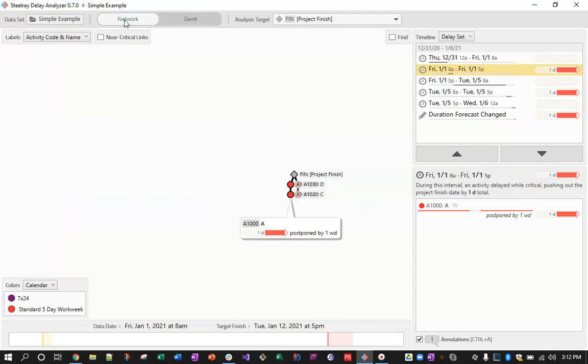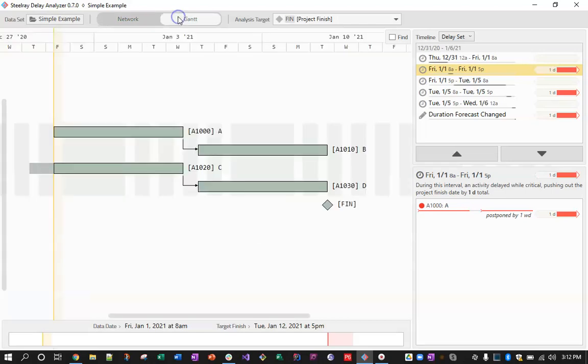So the network diagram view, first of all, is not on a timeline. So this level right here is not designating a certain point in time. We do that in the Gantt. And the Gantt chart traditionally moves left to right, and we do as well. You see this yellow bar here. That is really representing the status date or data date in Primavera. And as you can see, when I hover over it, the cursor changes, and that's because I can drag it forward in time.